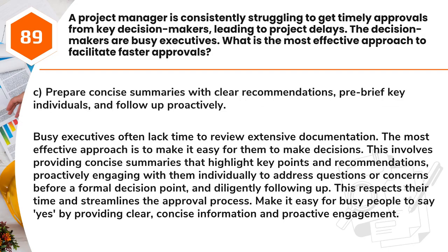Answer: C. Prepare concise summaries with clear recommendations, pre-brief key individuals, and follow up proactively. Busy executives often lack time to review extensive documentation. The most effective approach is to make it easy for them to make decisions. This involves providing concise summaries that highlight key points and recommendations, proactively engaging with them individually to address questions or concerns before a formal decision point, and diligently following up. This respects their time and streamlines the approval process. Make it easy for busy people to say yes by providing clear, concise information and proactive engagement.